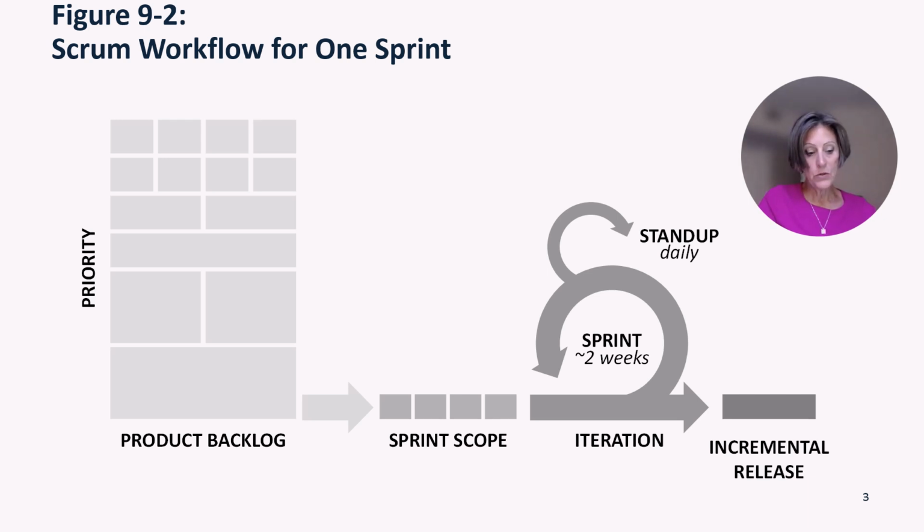In addition to incremental product releases, the overall Scrum project workflow includes a cadence within each sprint, starting with the product roadmap and feature backlog. Because Scrum teams are small, there are several planning ceremonies and rituals to integrate the individual projects with the larger business vision, objectives, and goals. Figure 9.2 shows the Scrum flow for a single sprint. A sprint starts with the prioritized product backlog and ends with the release of working software or another agreed upon deliverable.